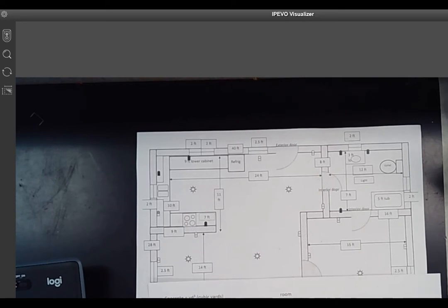Now, when you do all the math here, this ends up being 20.7 yards cubed, but we never work with partial yards. You only have wholes, so that becomes 21 yards cubed. All right, that's that one.